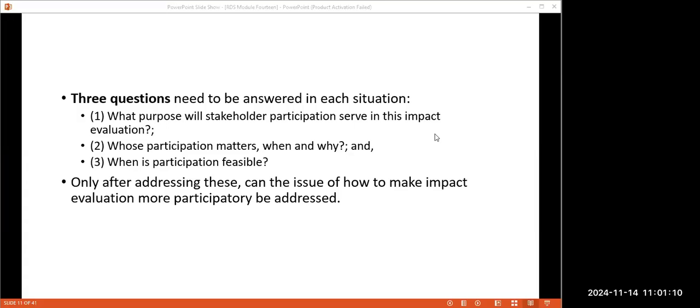I think since we've already started, it will be important to do it in the middle and then towards the end. In the middle, it will help us identify whether we are on the right track and the areas we could change. At the end, we can check whether we've attained all the impact that we anticipated. So it will be good to do both in the middle and at the end. But if the project has not started, it will be wise to do it at the beginning, the middle, and the end, at least three times.